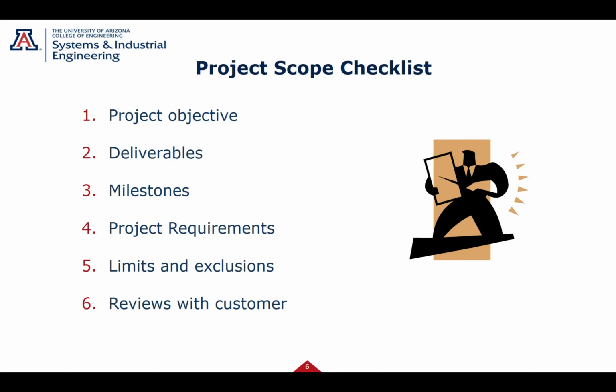But for long projects, what are the milestones along the way? What are the requirements? We'll talk about that. What are the limits and exclusions? What are you not doing? This does not include this, this, and this. And then are you scheduling reviews with your customer? Again, for longer projects, what is the reviews with the customer? Okay, again, small project, maybe you don't care. But generally speaking, you're going to have a series of reviews. What are those specific reviews?